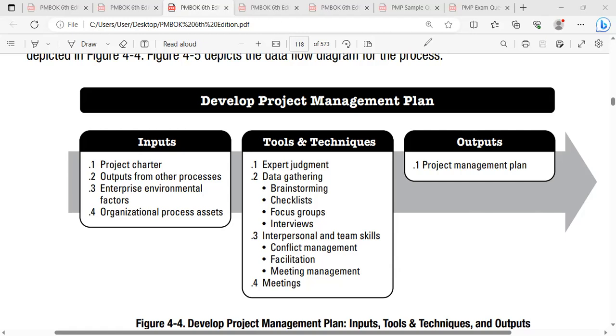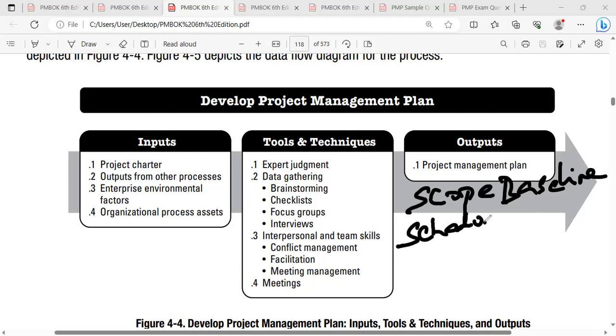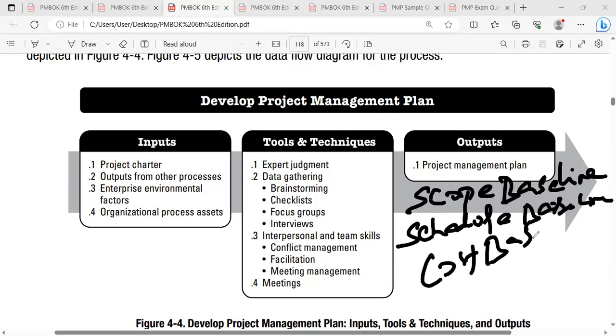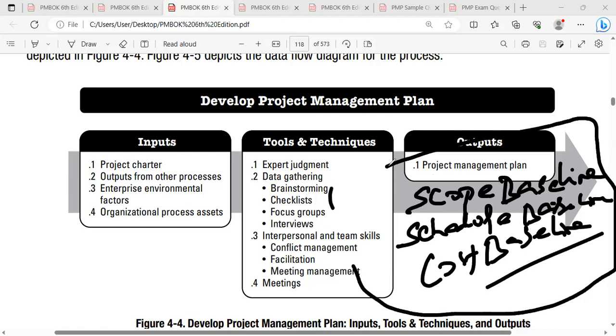Yes. So please note down. For scope management, the technical department is advised to establish a baseline called the scope baseline. Everyone is attentive, right? The planning engineers will be asked to establish a schedule baseline. The cost department is going to establish a baseline called the cost baseline. So there are three baselines, which is very important.